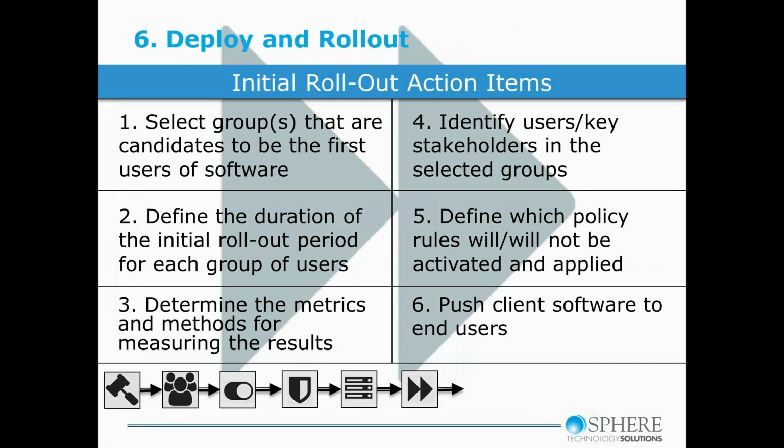The first one is around picking the people that are going to be part of your initial rollout. Here you can be slightly strategic, maybe even opportunistic, and pick a friendly team. Pick a place where you can hit a home run off the bat. With that friendly team, though, you have to be cognizant of number 2. They're going to give you tons of functionality requests, so many ideas about customizations, because I bet the people you're picking have a vested interest in the success of this project.